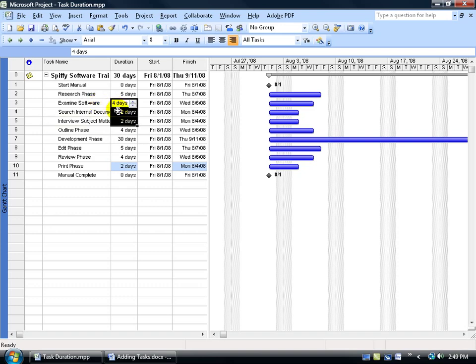What's the longest task here? 4 days. So by default, when I convert this, it'll say 4 days is the summary for all these 3 subtasks down below. For right now, to keep it simple, I've added some of my summary task, a few detailed subtasks, and I'm typing in all the days. When I get a clearer vision or more feedback from other managers and resources, I'll update this, and when I'm ready to go, I'll move on to the next step and start creating outlines here.